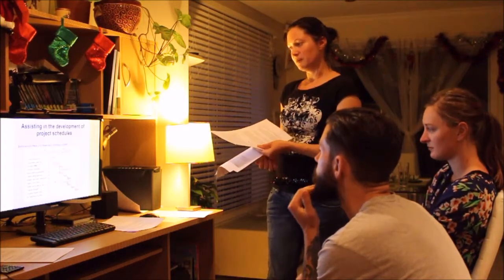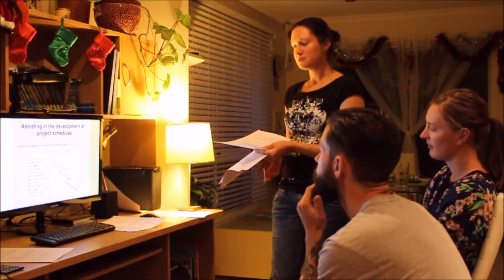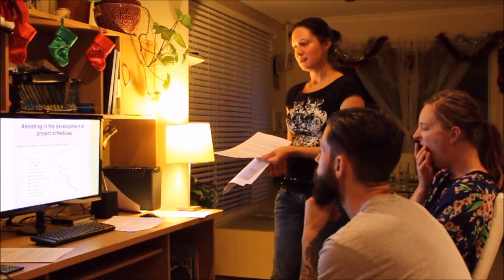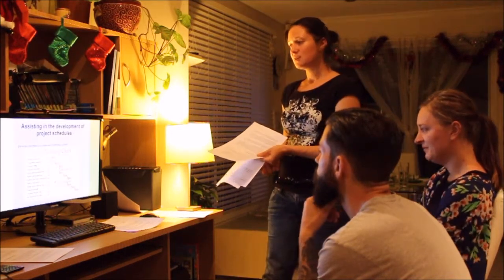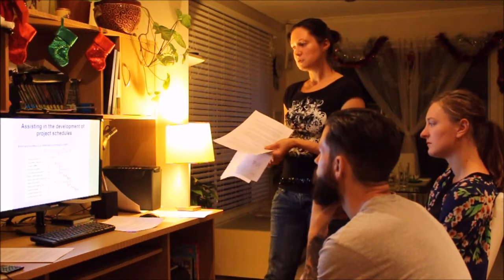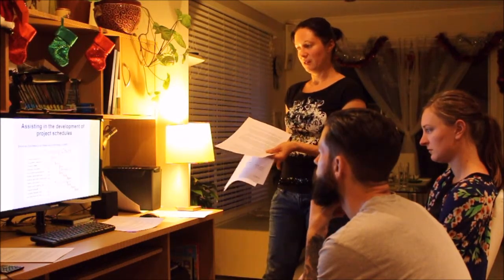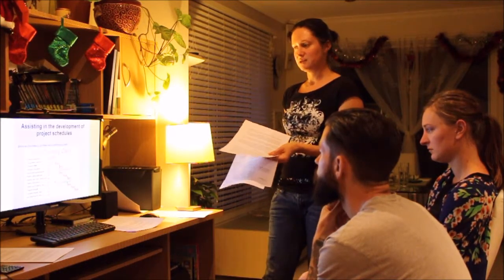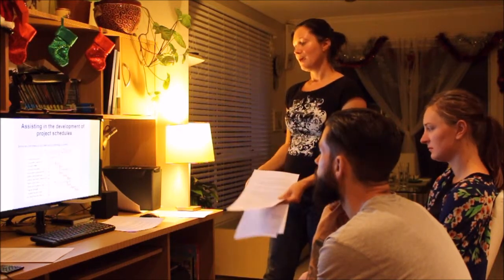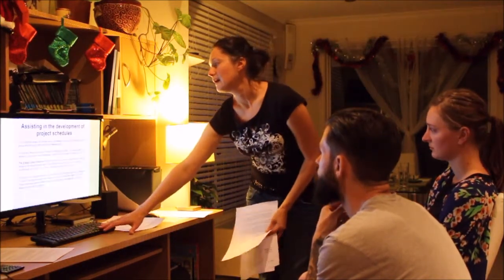So you document your assumptions, define dependencies, assign and level resources, define milestones, prepare budget, compile project plan, and get approval for your plan.